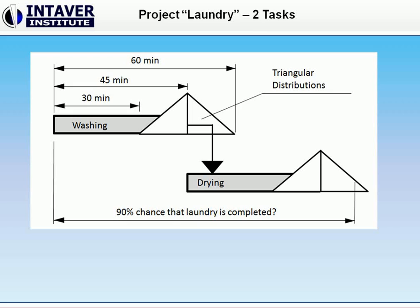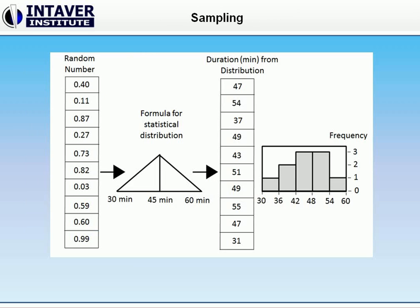Monte Carlo offers a universal way to analyze your schedule. Here's how it works. The first step of the Monte Carlo process is to generate a random number for each task. Then, based on this random number, we get a value from the statistical distribution. In our case, we get the duration of the washing or drying cycle from the triangular statistical distribution. Monte Carlo will take the values associated with the hump of the distribution more often than the numbers associated with the tail of the distribution.